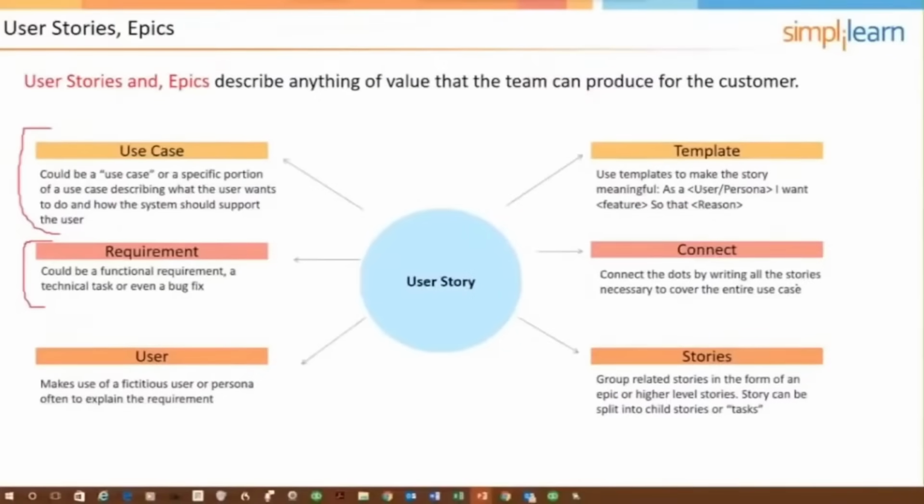And so the priority of the user stories in the product backlog, while it might start with just simple functional user stories coming from the product owner, will evolve until it includes some other things that are also considerations when it comes to priorities, because of successor, predecessor relationships, dependencies, and things like that.